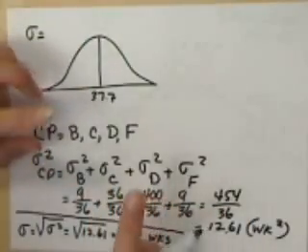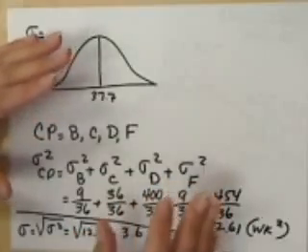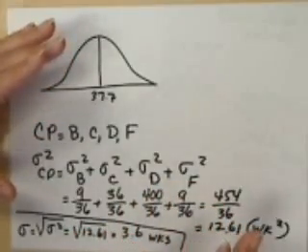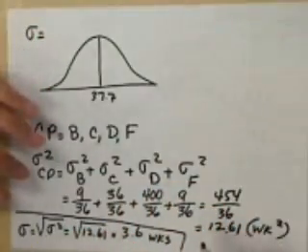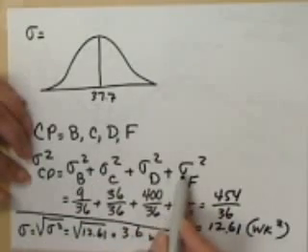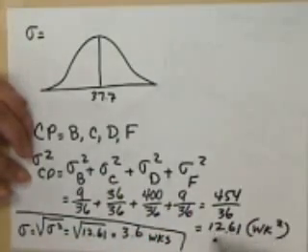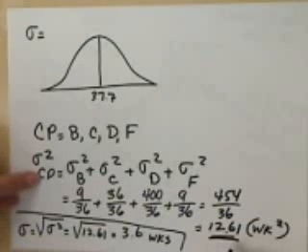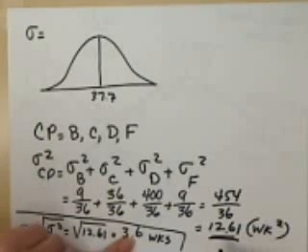That would give you the wrong answer. Mathematically, it's not the same answer. So what you need to do is add up all the variances for the critical activities. Once you know the variance for the critical path, then you need to take square root of it and get the 3.6.